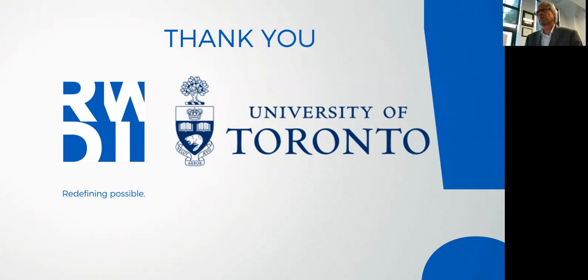They are not required. The O&M manuals are actually required of the commissioning agent. However, the as-builts are required of the contractor, and they have to be in the commissioning document that I sign. Yeah, so the commissioning provider would review those. Obviously, the contractor is going to help kick off that O&M manual, but the systems manual is something the commissioning provider would develop. The O&M manual, which is an amalgamation of warranties, contact information, submittals and as-built drawings too, is reviewed for accuracy by the commissioning provider.